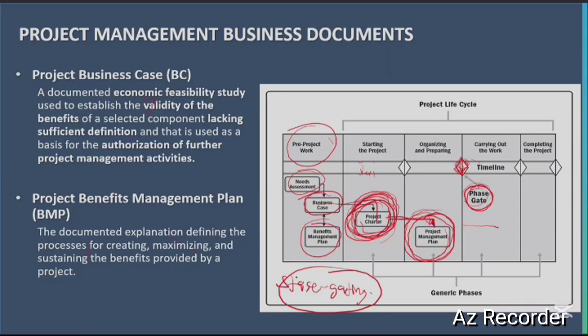So we put a gate at the end of every phase. When we get to the end of the phase, we need a key. We need approval. So we check. PRINCE2 does it better. Okay, it's called managing stage boundaries. At the end of every stage, we'll check whether the project is still justified. We can still carry on. It's still feasible. It's still viable. If you think it's no longer viable, we put the brakes on the project, and portfolio will do that work more.